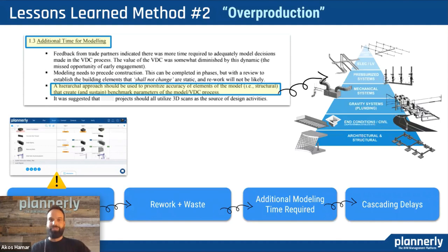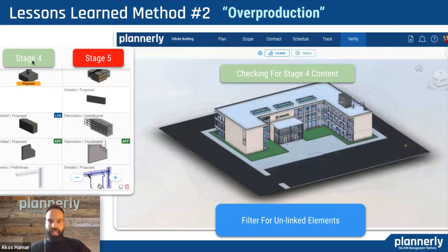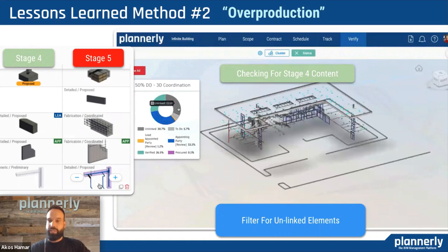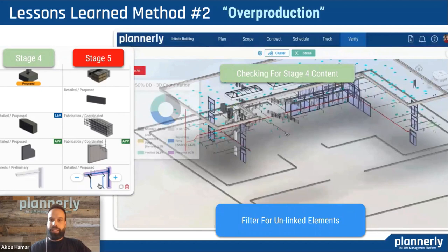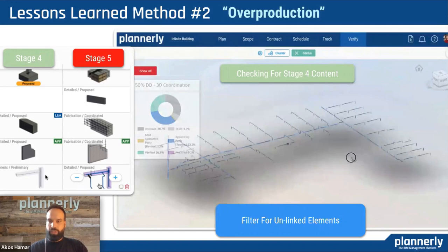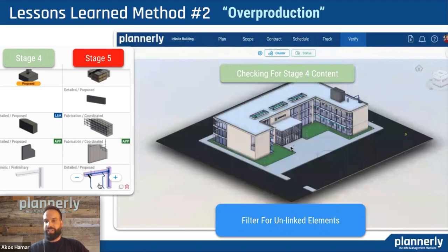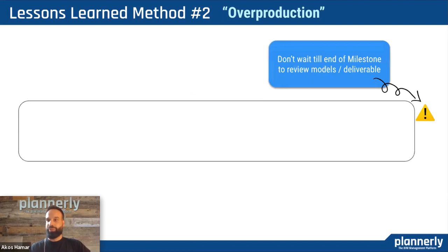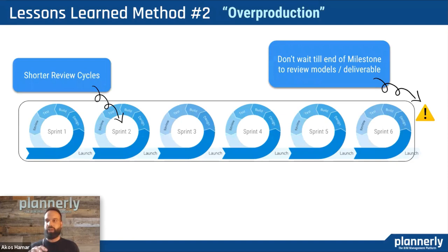The way to address overproduction is to have a plan in place and follow it, but also to identify if something was produced too early, too fast, too much. Check the model — for example, in stage four content, filter for different statuses and look for items that are unlinked, not attached to any tasks. You might find that on stage four only the mains should have been modeled, but when you filter the model you find some branches also modeled. Architectural design is going to improve, fixtures and walls will be moved, and those pipes will be in the wrong location requiring remodel. The lesson learned here is not to wait till the end — break the project down into smaller chunks, time-wise and location-wise, and have an opportunity to check early how models were created. Use shorter cycles and shorter sprints to capture overproduction as soon as possible and report it back to the team.